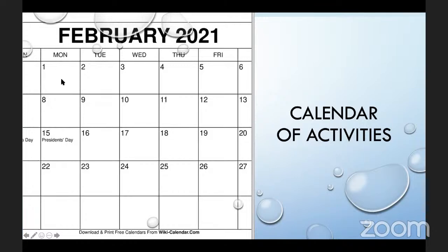So what are we doing at the sprint plan and kickoff meeting? Usually we're talking about how this sprint, we have this number of stories, and this is what we're going to work on. That's the typical scenario. In the morning of our sprint planning and kickoff, we talk about it: we have story ID 1425 about this, story ID 750, story ID this, story ID that. We talk about all the stories we're going to work on for that specific sprint. And not only that, we also do the assigning of the stories.